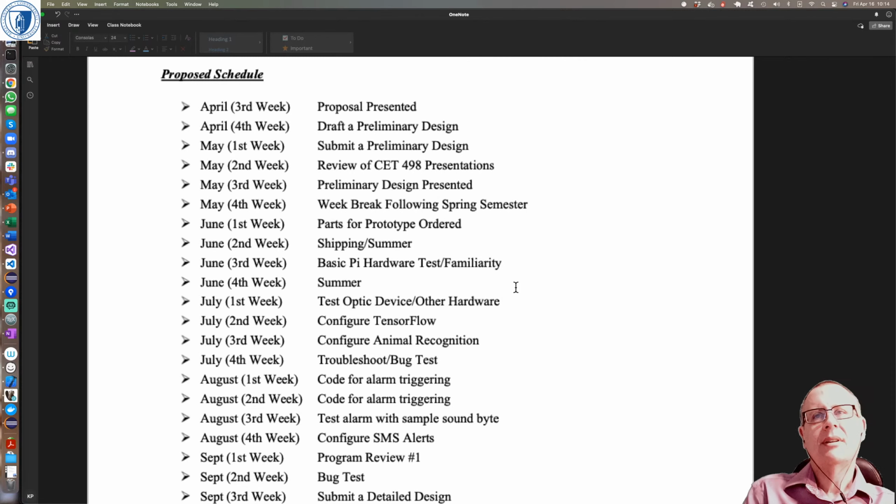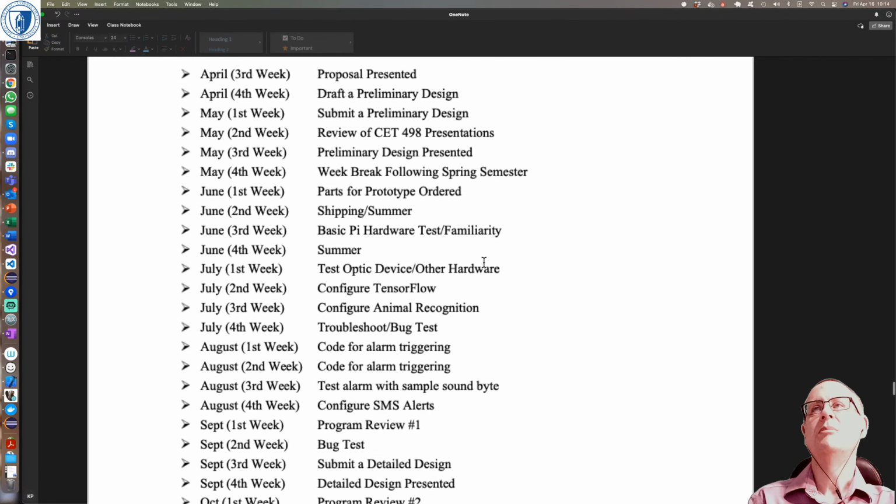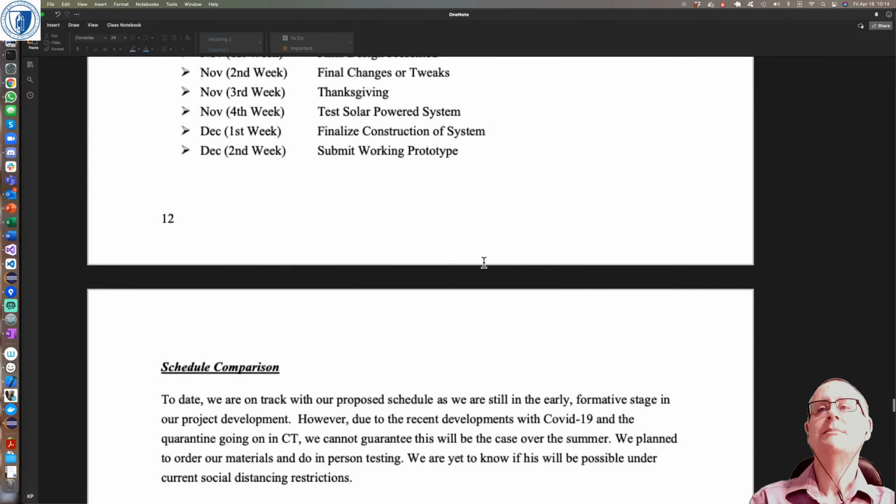And if you just have one task per week, then maybe you've only got one of the three of you working each week. It's probably not right, but that's what that says to me when you have a proposed schedule like that.